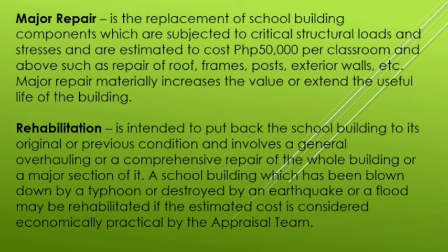Rehabilitation is intended to put back the school building to its original or previous condition and involves a general overhauling or a comprehensive repair of the whole building or a major section of it. A school building which has been blown down by a typhoon or destroyed by an earthquake or a flood may be rehabilitated if the estimated cost is considered economically practical by the appraisal team.